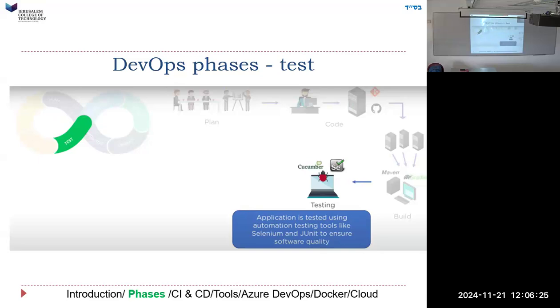And I want to make an important point here. When you're using the old system where you develop it and then it's all finished, you test it, you could have a team that tests everything. But when you're developing new features every 2 weeks, and any of those features that you added could ruin all existing features, every 2 weeks you need to test the whole system. You're not going to have enough time if you do it humanly. If you're releasing constantly, you need to have automated testing.